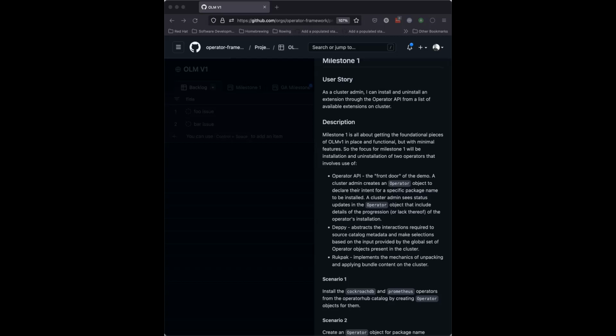If you're showing up to the working group meetings or watching recordings of those, ideally that's sufficient to clue you in on what is going to be happening, and then we'll have the demo meetings and you can watch the demo. Then maybe we want a per-milestone documentation task that, whether it's one of the engineers or you, we pick up and say, here's what we think needs to be documented from this milestone. We could do that once per milestone.